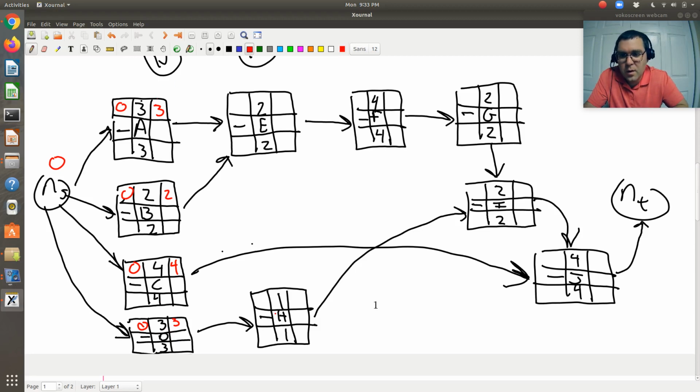Alright, so then as I proceed through my network, let's look at E. E has a precedence of A and B. So before I can move on to E, I need to complete A and B. What I'm going to do is look at the earliest possible finishing time of all precedence activities, and find the maximum value, because that's going to be my earliest possible starting time.